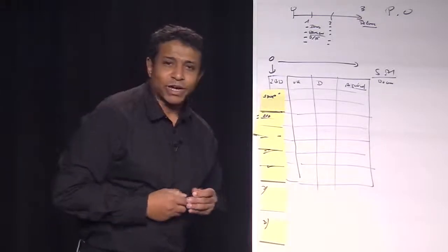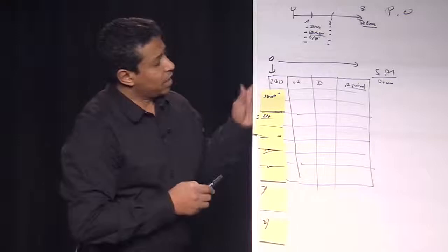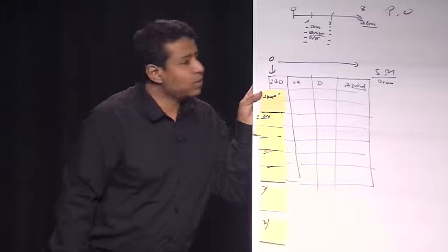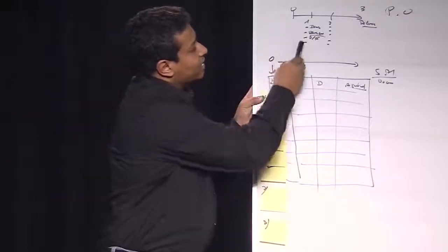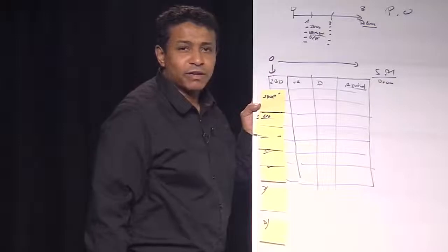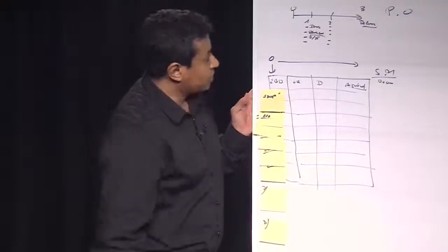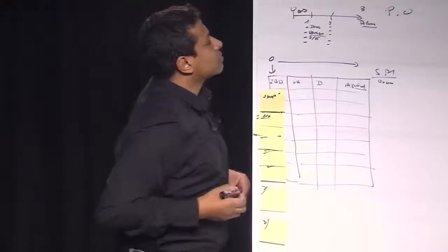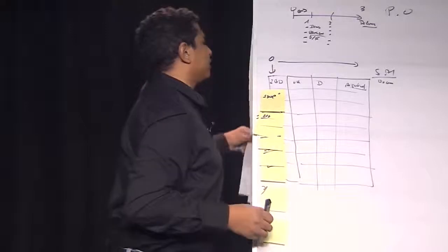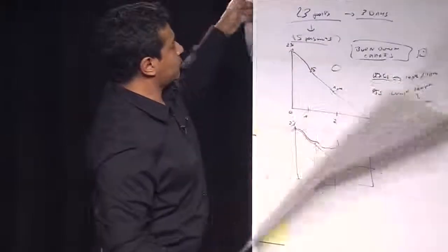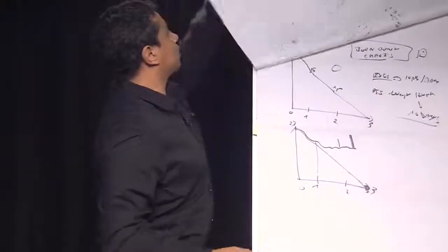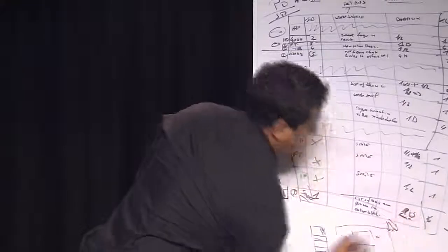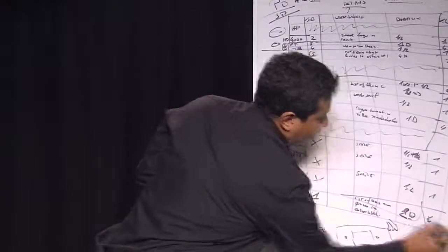Do you know exactly what it is? The thing that is missing here is the duration. Why so? Because if I have items to deliver the first day, the item I take on day 0 can last more than 1 day. For example, I've been a little bit optimistic.